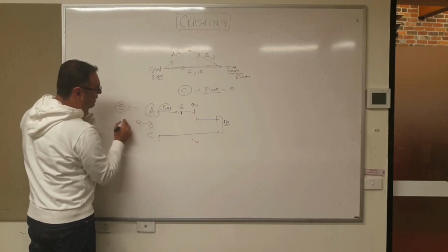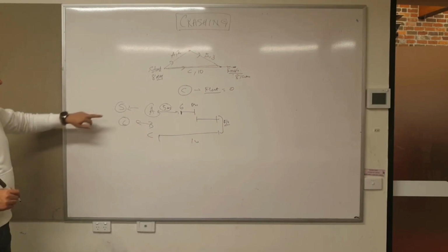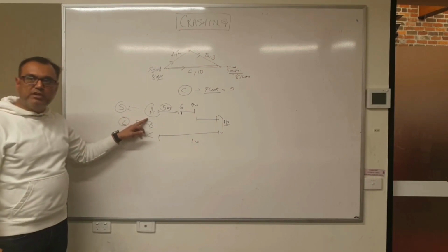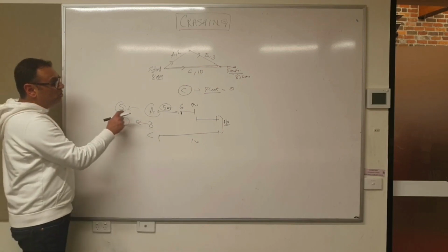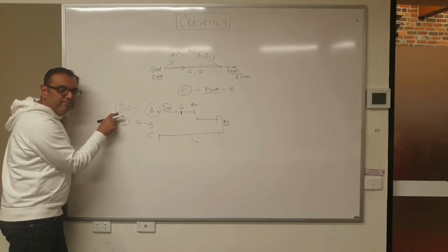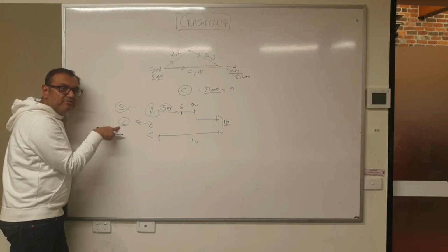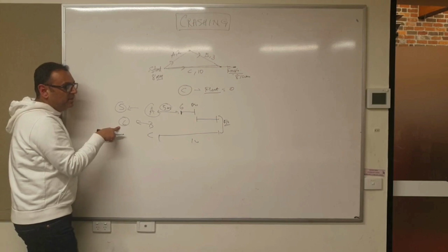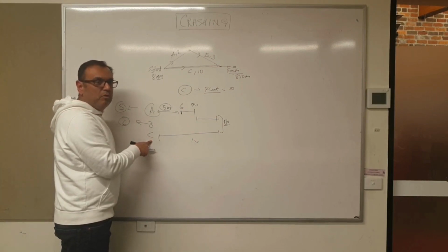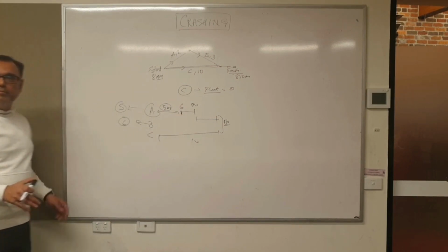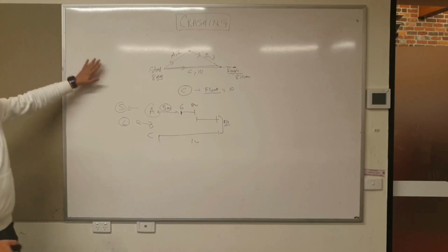And you can delay B by 6 minutes. After that, you cannot delay them. So the float on A is 5, and the float on B is 6 from the beginning, right? Make sense? But there's no float here. The moment I delay this, I'm gone. Right? That's the basics from last week.